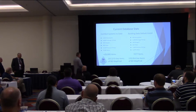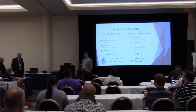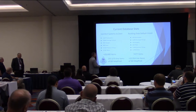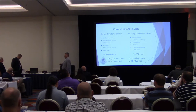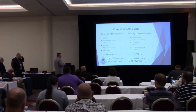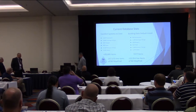Because when Josh downloads items from building data, he also validates that it has the correct pricing, the correct labor, whatever it may be, on those items before it gets distributed to our users. So that we know at the time they start producing a model with that, it's done, it's ready to go, okay? If I produce that spool sheet, I'm gonna get my labor hours on that spool sheet, okay? It's done, it's there, okay?